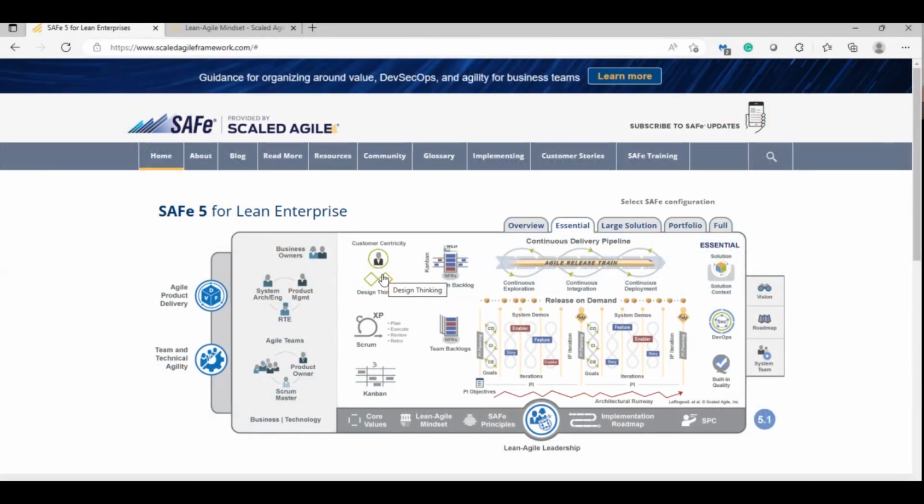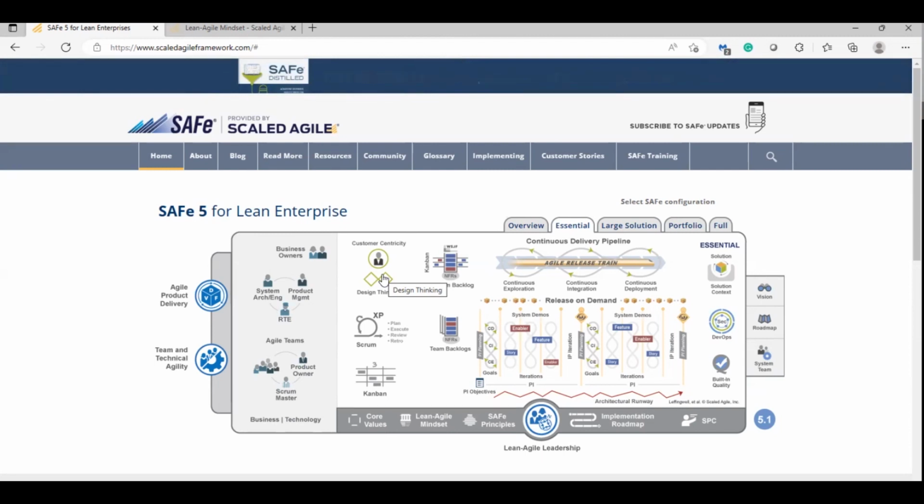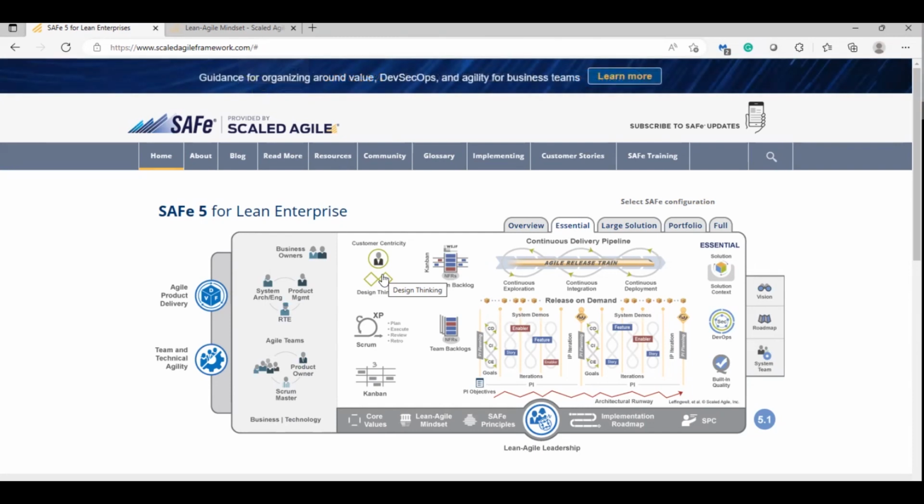Everybody, developers, testers, everybody: don't take 15 team members. 15 team members, I never accept it. If you have 15 team members, split into 2 teams, 8 plus 7. Group size should be very small. Team size should be very small.